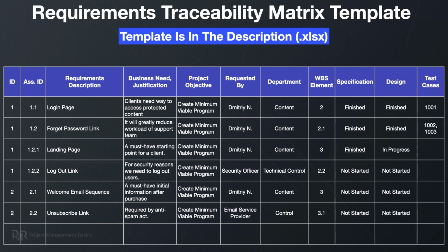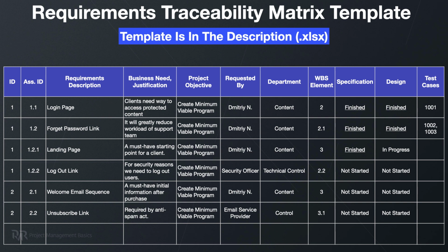And last but not least, even in a project management requirements traceability matrix, we need to list related test cases. But I recommend listing the UAT test cases or business validation ones. I don't think that you need to list all functional test cases here. Also, I see many examples where people just put IDs here, but be a modern PM and put links to the test cases or test suites in your test management tool or even a spreadsheet. Okay, this is a minimum viable RTM, however, you can extend it to your needs.